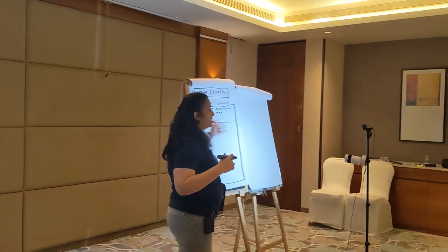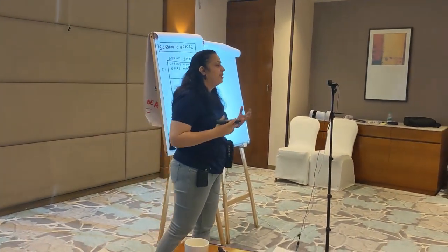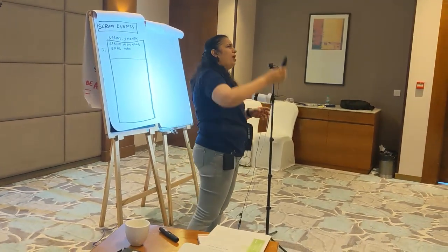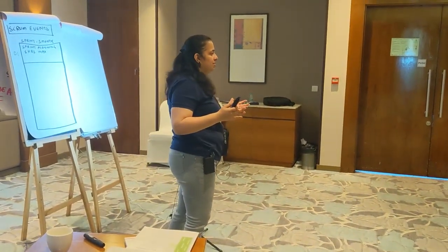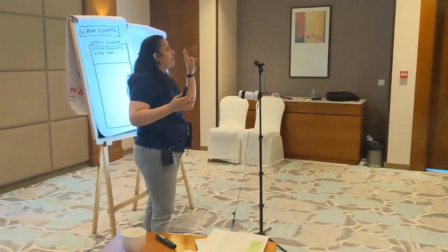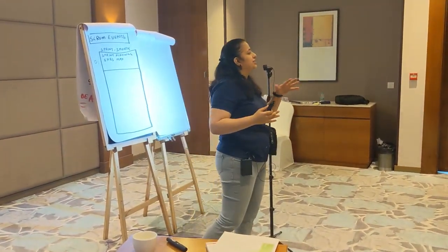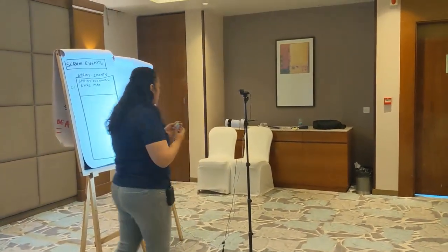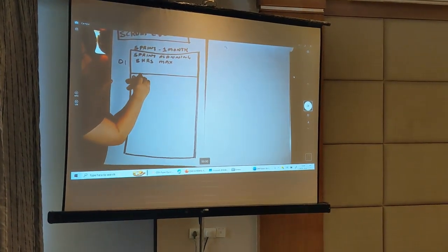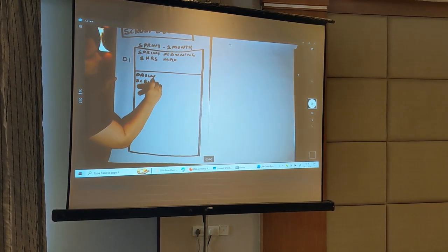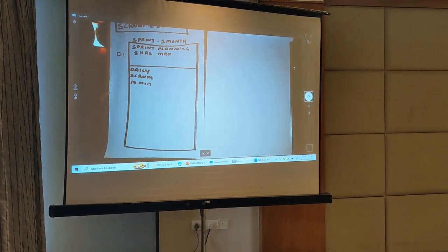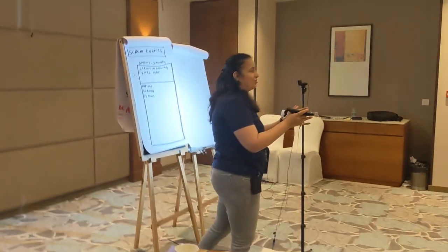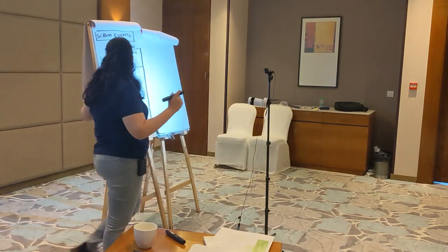Then the work starts. When the work starts, the developers come together every day to see how they are progressing on the plan that they made here. Which Scrum event could I be talking about? Daily. I heard 2 words. Somebody said daily Scrum, some of you said daily stand-up. The word in the Scrum guide is daily Scrum. Daily stand-up is a colloquial term. So, daily Scrum is an event which happens every day. The duration for the daily Scrum is 15 minutes. And it is not 15 minutes for 1 month and you do not go on shortening. 15 minutes. It happens every day.